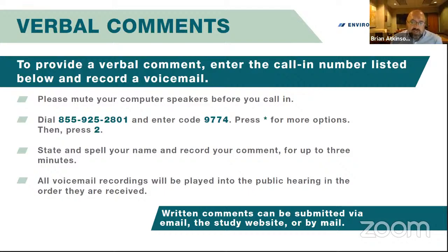Yeah, so as Darren mentioned, we'll be completing this environmental assessment the end of this year, into January. Once that's completed, UDOT's planning to move into design for that first phase of the project. And we've met with those who are impacted by that first phase of the project. So if you have questions about whether you're impacted or not by the project, and if we haven't met with you, I'd encourage you to get on our website and look at the maps and things we have posted there. If you're not able to determine that, call our hotline or send us an email. Like Darren mentioned, we're happy to take the time to come and meet with you and make sure we get you the information you need so that you understand how this affects you, for those who live adjacent to or along this project and this corridor.